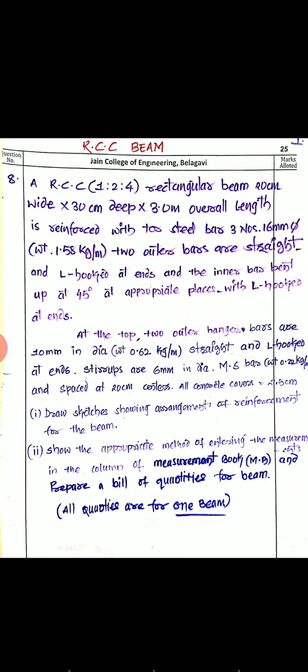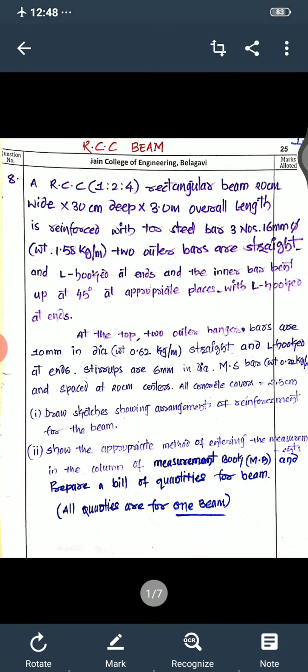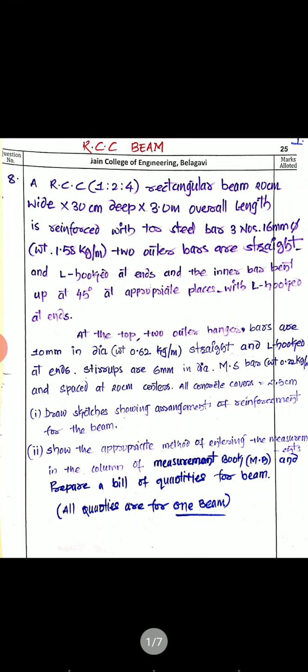We have to draw sketches showing the arrangement of reinforcement for the beam, show the appropriate method of entering measurements in the column of the measurement book, and prepare a bill of quantities for the beam — all quantities are for one beam. They have mentioned two types of steel: the main bars are tor steel and the stirrups are MS (mild steel) bars, so we have to separate the tor steel quantity and the mild steel quantity. Now I will start with the straight bars.